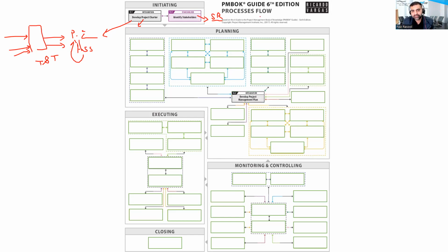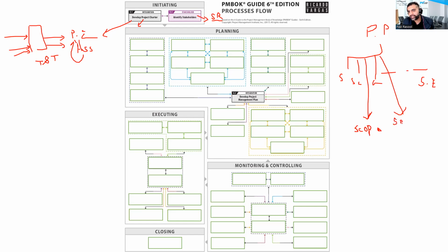Next stage is we need to plan for our project. The project management plan is part of integration management, in the planning process group, and it consists of around 18 different sub-plans. For example, scope management plan, schedule management plan, cost management plan, all the way to stakeholder engagement plan. Also, it includes many different baselines, called the performance measurement baseline. The 3 baselines used for performance measurement are the scope baseline, the schedule baseline, and then the cost baseline. We measure our performance against these baselines.